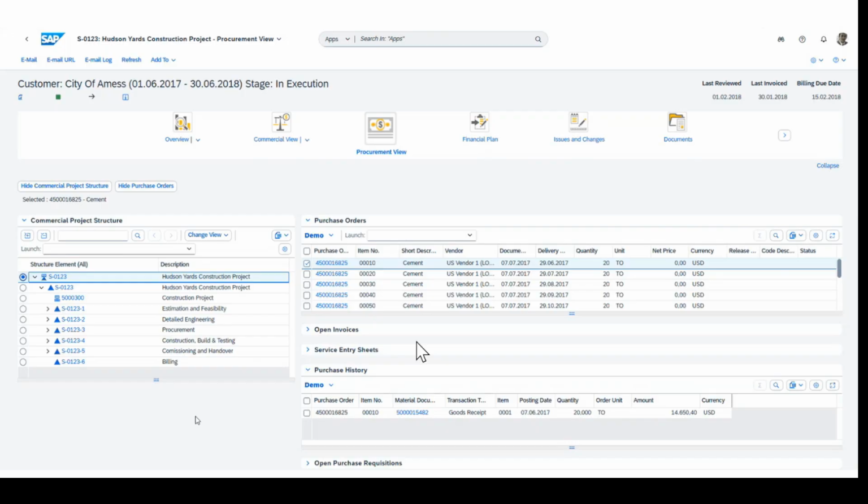So this is it. Then you have the procurement information. If you click on the procurement top icon, you will get the information relating to procurement. Again in procurement, you have an option, like below the WBS you have network and activity. At the activity or network level, the PRs are generated and the POs are created, based on the project-specific stock. And in some cases, during the creation of the PR and PO, the WBS is assigned. Then you will get this information reflected here.